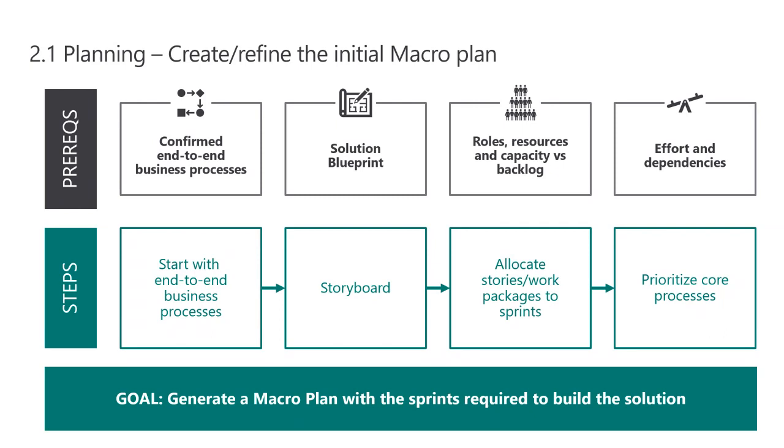You're not trying to do it on the basis of the minute task level things that may be in your DevOps or similar application. You're doing it at a business process level. Clearly prioritizing your core processes because you want to deliver the skeleton first before you start putting the flesh on the process deliveries.